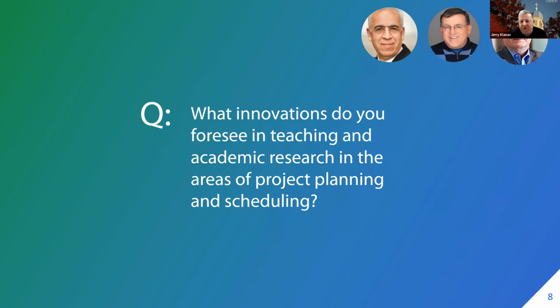There's a couple of things, from my perspective, that we're looking at for doing things innovative. For example, this year, for the first time, we had a building information modeling, or BIM, course taught by another faculty member, and it was a well received and well attended course. A lot of students were really keen, and seeing the output of that, it's recognized that we need to do more in taking the BIM model and doing what they call the 4D approach, which brings in schedule information so they can really see how it's being built over time.